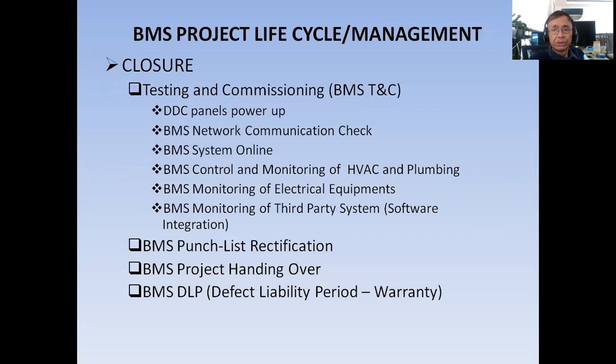After this TNC, you have the BMS punch list certification. When you are doing the TNC, the consultant will give many comments. Once the comments are given to you, that's the time to rectify them. Once you rectify the punch list, call the attention of the consultant again where the punch list occurred. You have to show them that you have rectified the raised comments.